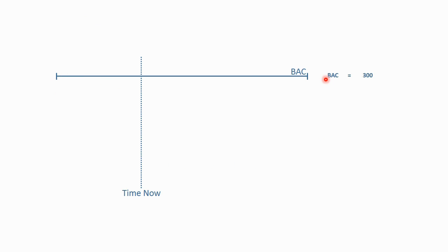All right, so again, we have our budget. We've got time now. We've got budgeted cost of work scheduled. Now you notice in these examples, this budgeted cost of work scheduled always comes out here. The plan is the plan is the plan. You can change a plan. You've got to be very careful about doing that. If you find that the plan is so out of date that it's just not useful to compare what you actually perform and what you actually spend to the plan, you'll replan. But what most managers like to do is plan the plan and then baseline it.